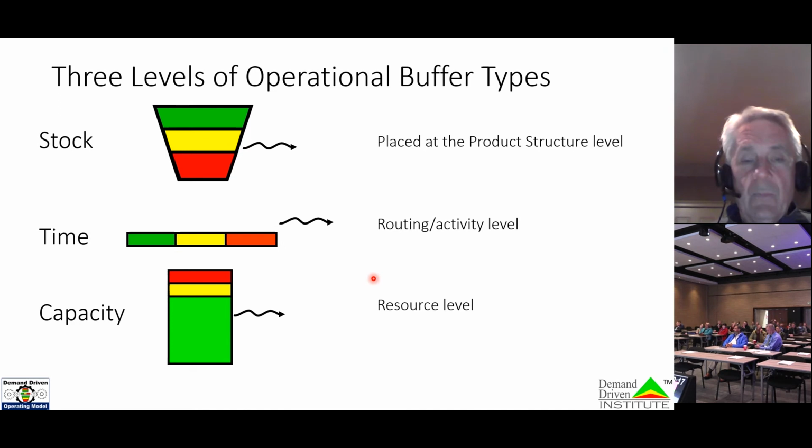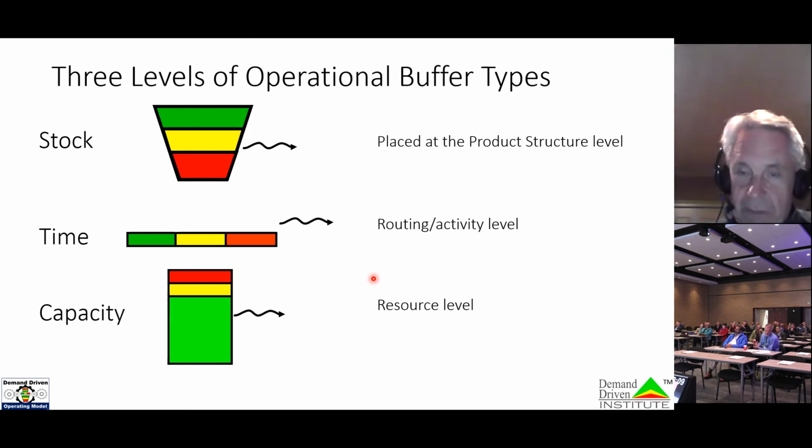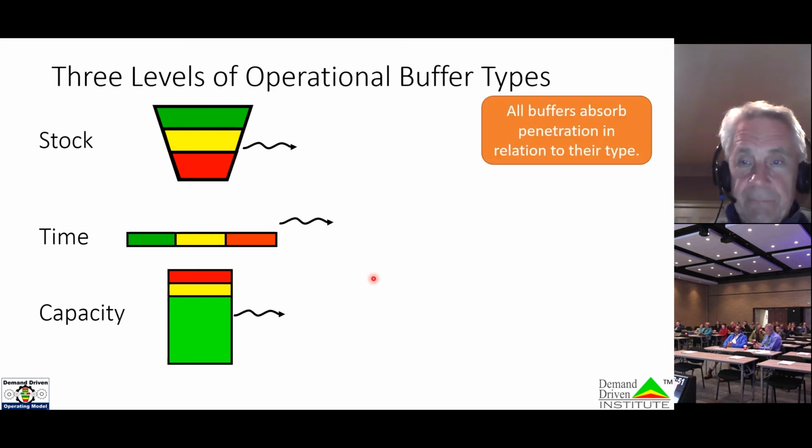So in fact, we want other resources to have excess capacity, which is a bit counterintuitive to the finance folks out there who believe that cost per unit produced is the only measurement that matters. When in fact, if we don't have extra sprint capacity, we're going to be encumbering our overall system output, because variation is going to occur. And if we don't manage variation well, we're not going to be happy with the results we get.